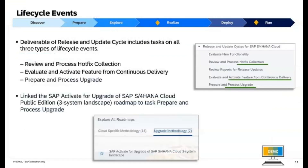Lifecycle Events and Hot Fix Collection: The SAP Activate Methodology updates for lifecycle events include adding tasks to the Release and Update Cycle deliverable, covering three key lifecycle events: Review and Process Hot Fix Collections, Evaluate and Activate Features from Continuous Delivery, and Prepare and Process Upgrade. These tasks streamline lifecycle management, and the SAP Activate for Upgrade of SAP S/4HANA Cloud Public Edition Three System Landscape Roadmap is now linked to the Prepare and Process Upgrade task, offering a structured guide for handling upgrades in a three-system landscape.